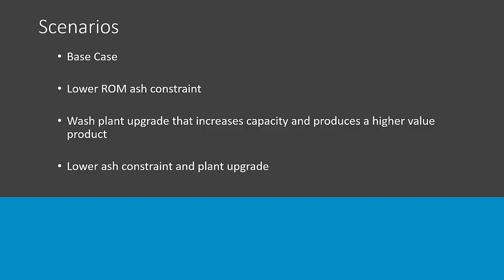Okay. These are the kind of scenarios and decisions you can run in Scheduler very quickly. You know, I take my first base case scenario, clone it, make a little change, clone it, make a little change, and then I can present all of these options and look at these different sequences to see, does a small change here in a sensitivity completely change my future schedule? In that case, it may not be that robust of a schedule for the future.